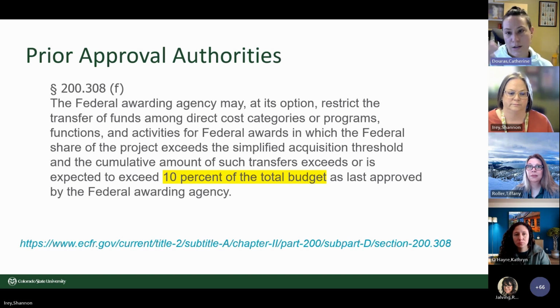They were then requesting budget reallocation to use some of those travel funds towards paying more salaries so that more of the work could go on as happening here and not traveling. So again, you look at the total amount of your budget. If you have a $300,000 total budget, you can move up to $30,000 between categories before we have to ask the sponsor for approval.